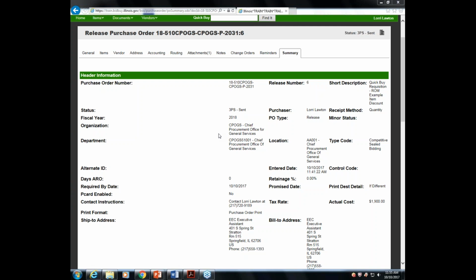You gather all of that documentation together and say it needs to go to the comptroller's office, right? So you have that copy that goes to the comptroller's office. It has the signed contract, it has any supporting documentation, maybe it needs the supporting cost sheet to demonstrate to the comptroller's office that you have the right price.